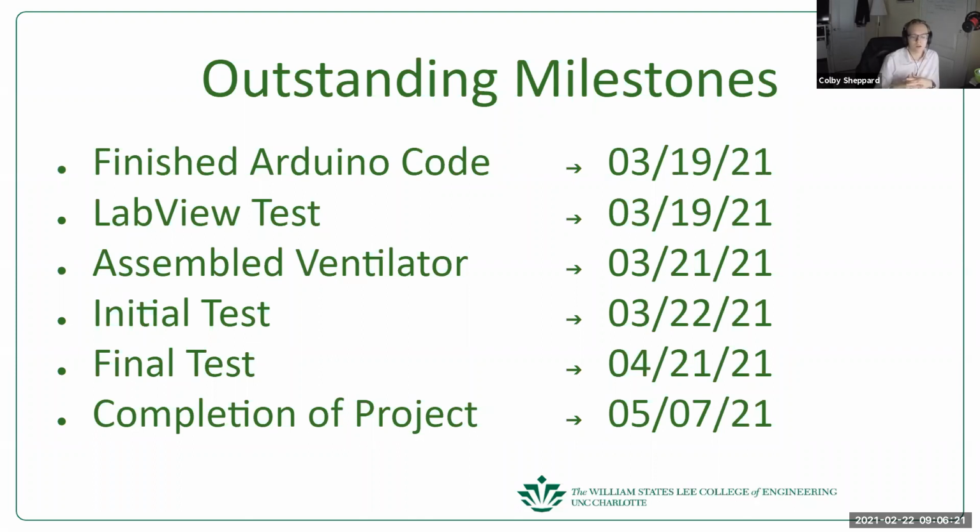We have a lot done for both sides, yes, but at this moment, I at least am not confident putting them together. I don't know how to put them together at all. So we're going to have to figure that out, and that's why we're giving ourselves enough time. We're also going to be working on getting it assembled at the same time, which is why we have a 2-day lead time for the assembled ventilator.